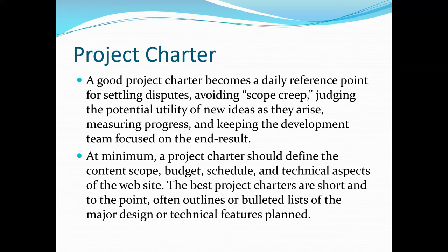A good project charter becomes a daily reference point for settling disputes and avoiding scope creep. In project management, scope creep means we have a project planned to finish in six months with ten features, but as time goes on we keep adding more features — ten become eleven, then twelve — and instead of finishing in six months, we extend it to one or two years. We avoid scope creep by setting clear boundaries for the project, and we'll discuss it in more detail in future lectures.